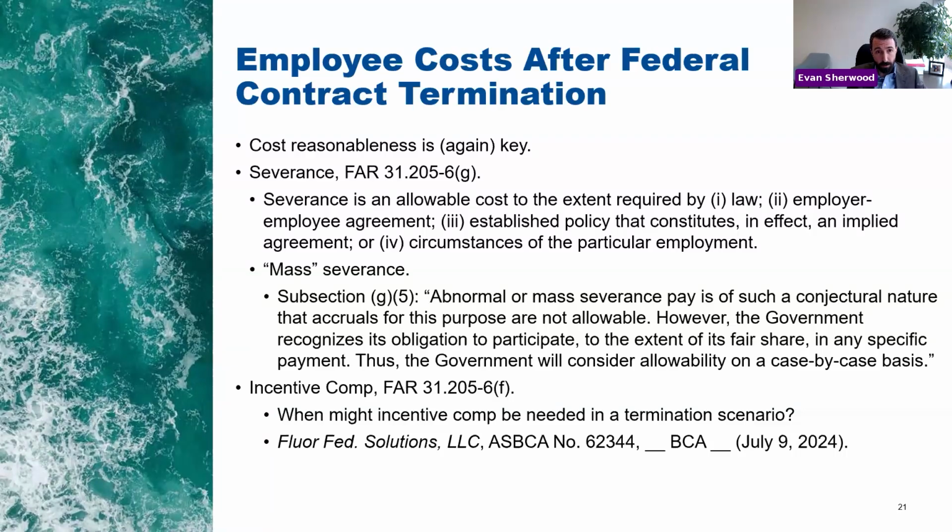You may have severance costs for employees, right? You may have federal, state, or local law, depending on the circumstances of employment, that may mandate a notice period. There are things like the WARN Act and various state WARN Acts that can require ongoing payment to employees, even if the company determines that it's not going to need their services in the long term and needs to do a reduction in force.